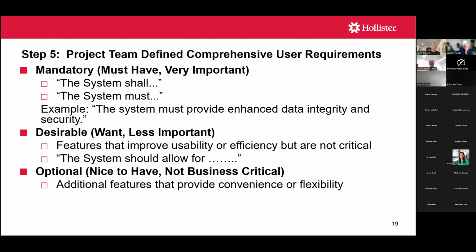Just as an example of a mandatory user requirement, the system must provide enhanced data integrity and security. So when you write these out, we use the verbiage, the system must or the system shall, again, for the mandatory.